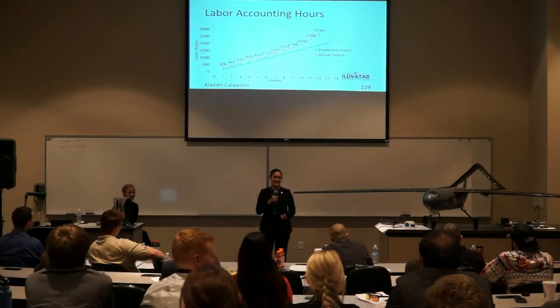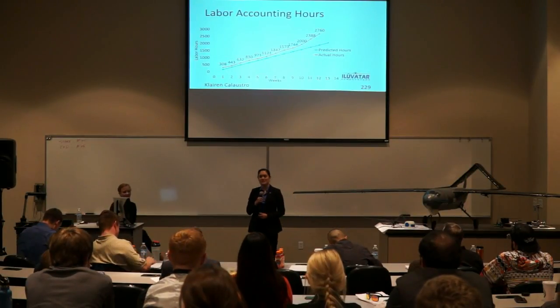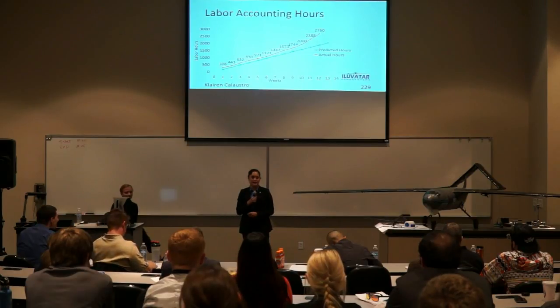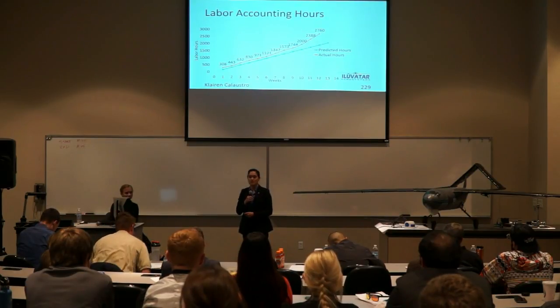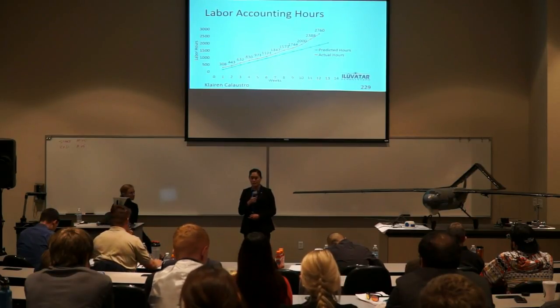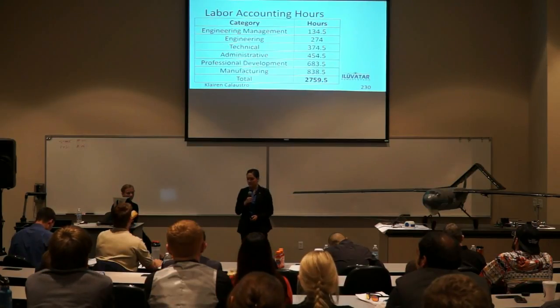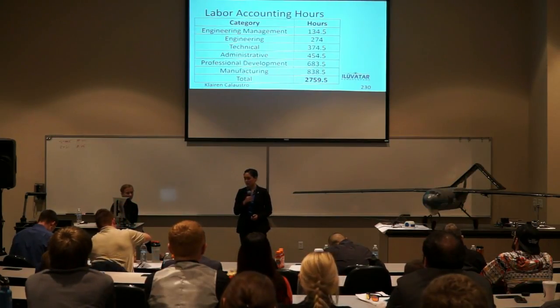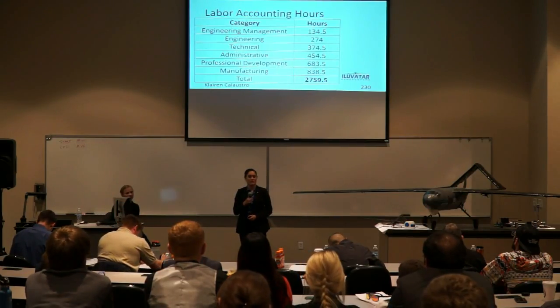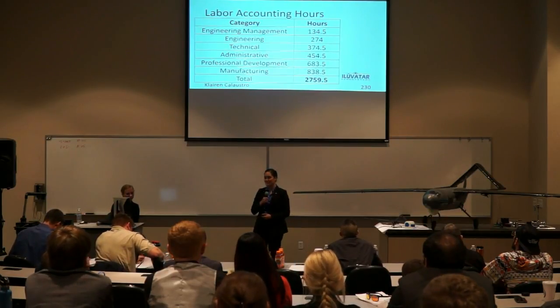So we were well above hours, and we're thinking that's because we wanted everyone involved in the manufacturing process and the design. We felt it was important that everyone was in XFAB, or at least 2 people at a time, during manufacturing. So that could also explain why we had so many more hours. Breaking it down, manufacturing hours were just under 340 hours, and that was in a month and a half. So there's a lot of time and effort put into the manufacturing alone.